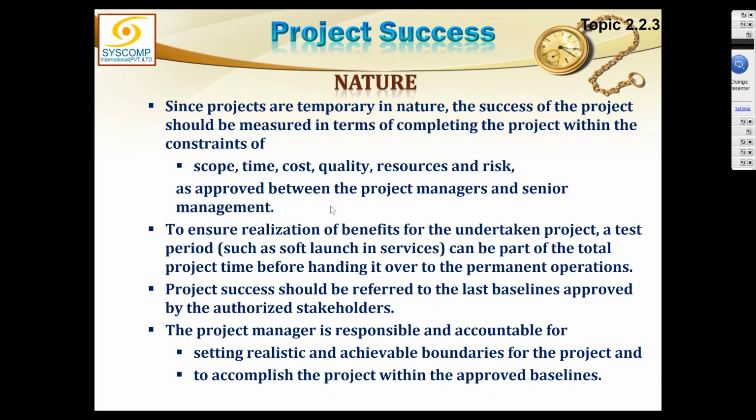Once we have constructed the school, we will run it for a specific period of time, like you are doing a project on a turnkey basis. So we have not only constructed the school, we are running it for some period of time, and once it is in full motion and starts performing, then we will smoothly transition it to operations or the customer.